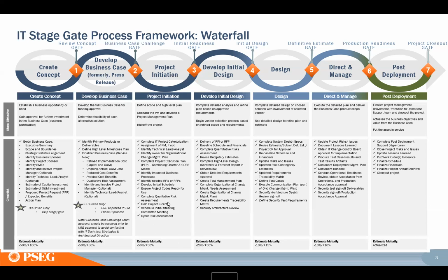So we worked with cyber on these, as recently as last month, to say, how do we get it in good? A proof of concept is part of design, if it's created as a pilot. A pilot is usually in design because you're going to make design changes based on what comes out of that. So if they have requirements like that, it's just additional requirements.